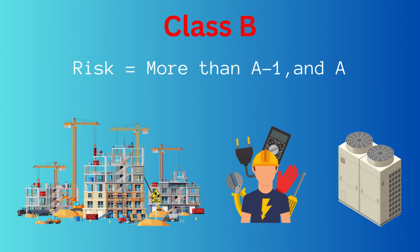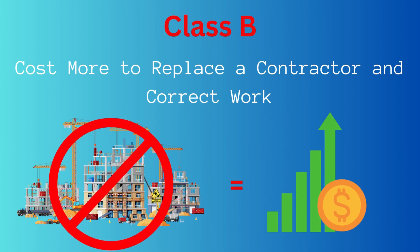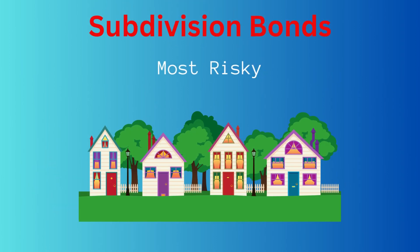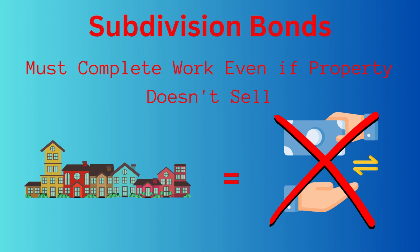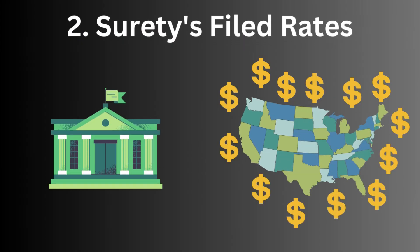Class B is considered more risky than class A. Class B construction includes MEP, general construction, and others. From a surety perspective, this carries more risk because a default will likely cost the bond company more — a new contractor will charge significantly more than the bonded contractor to complete the contract, and work may also need to be torn out and corrected. Completion bonds or subdivision bonds are considered the most risky, because these bonds require the contractor and surety bond company to complete a contract even if payment is not received.